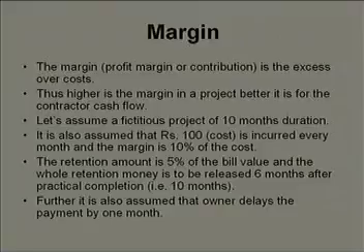It is not very difficult to guess that the higher the margin in a project, the better it is for the contractor's cash flow. Higher margin means what? You must have spent less cost and you are demanding more money from the owner. That is possible when you have put a higher margin in your project for each of the items. So, better margin means you will have better cash flow. That means, here again, you are trying to extract maximum money from your owner to run the project.